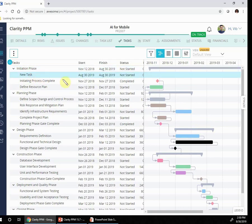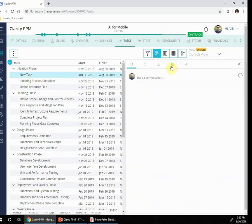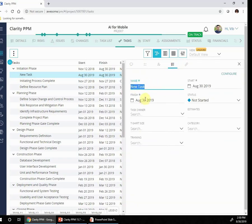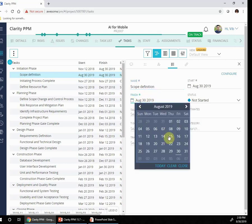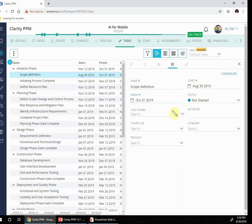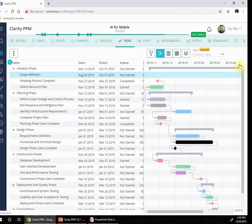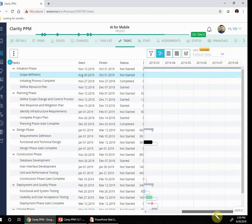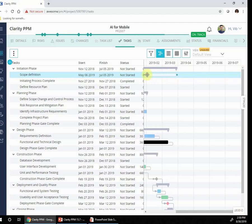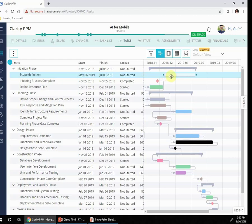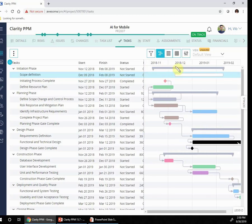Let's create a new child for my initiation phase. There is my new task — I can go into the details and specify additional information; I'm going to call this 'scope definition.' I can specify a date range — in this case it'll run for two months — and specify additional information. The new task is created and in my case it appears towards the end of my time period, so I can drag it over to a different time, bringing it towards the end of the year.